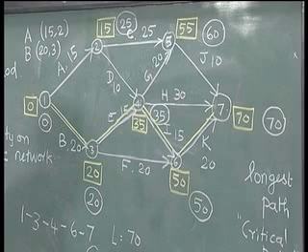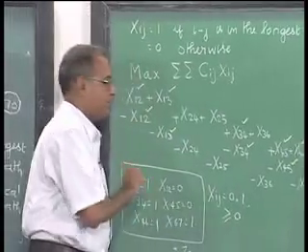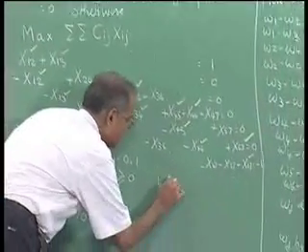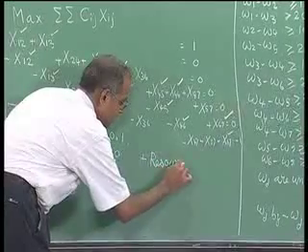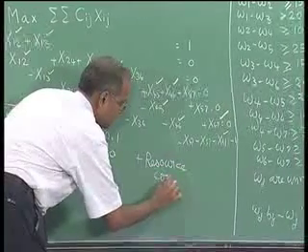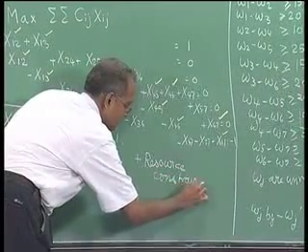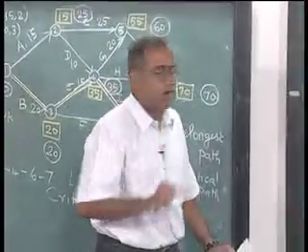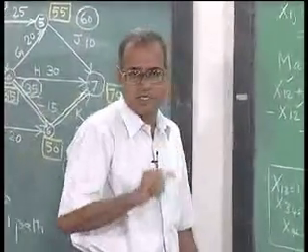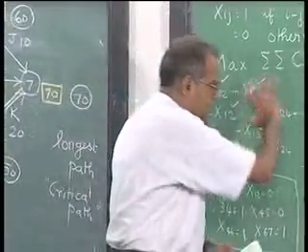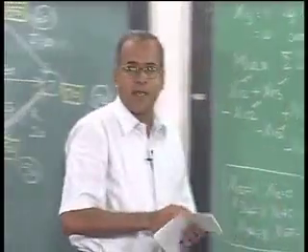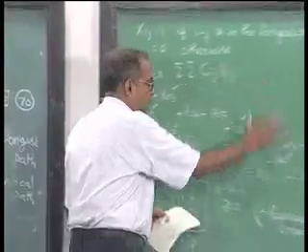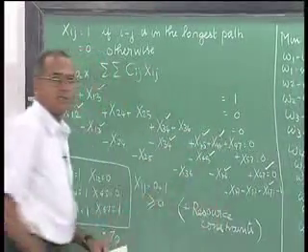So, the resource constrained project scheduling problem will now become a very similar formulation of the CPM problem plus resource constraints. In fact, the actual formulation will be slightly different from what we show here, but in principle it will be the longest path problem with resource constraints.